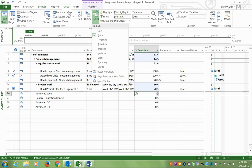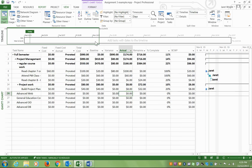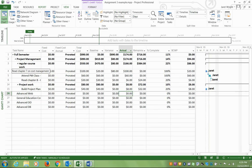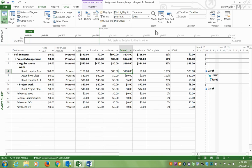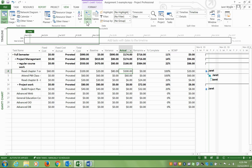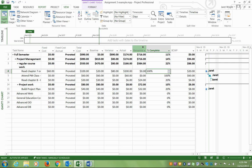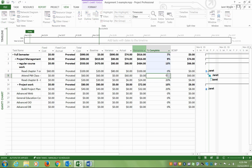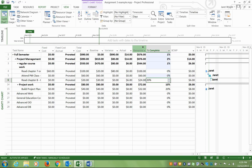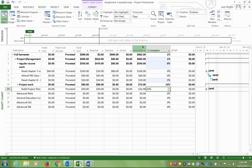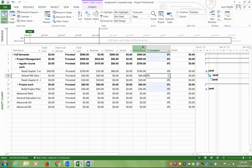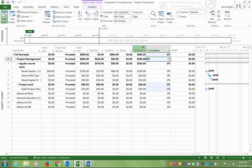So now I have a lot of information available to me. If I go to Tables, View, Tables, Cost. Now I can look at it. Oh, look at this. I did a bad thing. I didn't set my baseline yet. Shame on me. Let's go back. Let's set these back down to zero. As soon as we had the cost, we should have set a baseline.